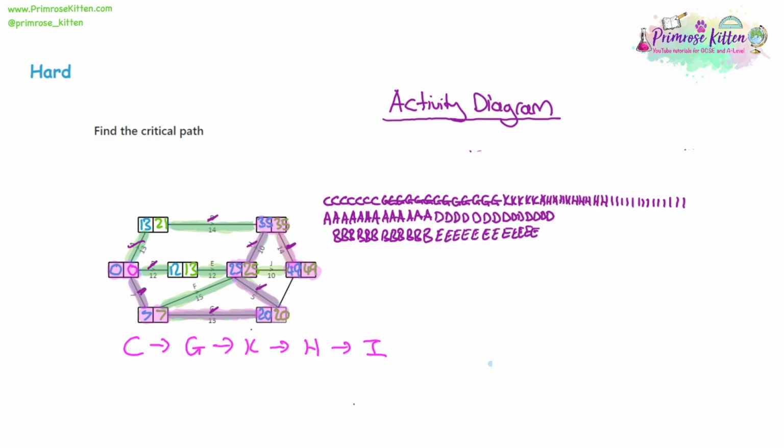And you can see that E finishes just before H starts in the top column, because H is dependent on E. So you have to follow the rules of things that are dependent on each other. You can't start things later on. D has to finish before I starts, for example, and you can see there is a space there. There's enough room for D to finish. So we've done E. After E, we could do J, and that's got 10 units.